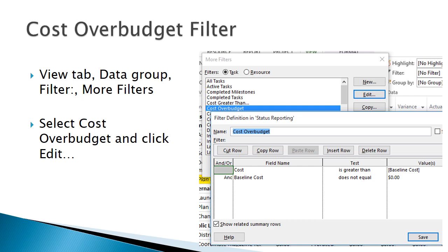So is this a feature or a bug? And how do we fix it? Well, first, we might consider if all tasks have appropriate assignments before we create a baseline. But with rolling wave planning, we don't always have that up front. This might also be a task performed by someone in another department. While there is no charge to the project for that resource, the project does need to supply the materials.